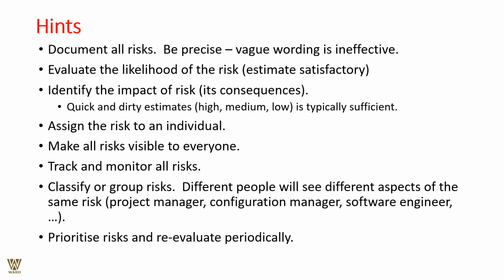Evaluate the likelihood of the risk, estimate satisfactorily. Identify the impact of the risk, its consequences. Quick and dirty estimates, high, medium, low, are typically sufficient. Assign the risk to an individual. Make all risk visible to everyone. Track and monitor all risks.